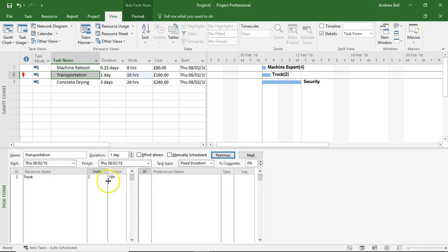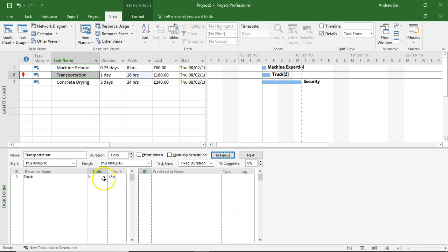If I put two trucks on this, guess what - it's still going to take a day. What's happened is that I'm now driving two trucks. I've got double the amount of work and double the cost associated. So a fixed duration task does not change no matter how many resources you put on it.